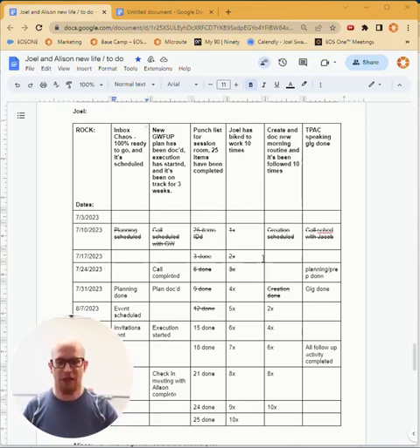So if you get in the middle of it and you discover, well, the milestones that I set didn't work, that's fine. Change the milestones. With a rock, we set the rock and we don't mess with it all quarter. The milestones, mess with them as much as you need in order to make sure that it's helpful for you. Now, obviously, if you just keep changing them so that you can be on track, well, that's going to backfire. But feel free to change them in the middle of the quarter if you discover that what you're doing isn't helpful.